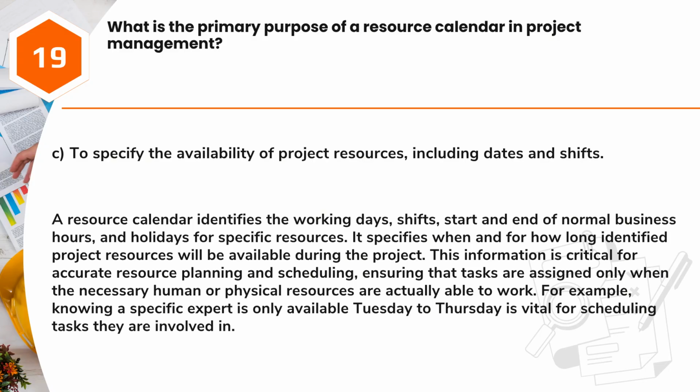A resource calendar identifies the working days, shifts, start and end of normal business hours, and holidays for specific resources. It specifies when and for how long identified project resources will be available during the project. This information is critical for accurate resource planning and scheduling, ensuring that tasks are assigned only when the necessary human or physical resources are actually able to work. For example, knowing a specific expert is only available Tuesday to Thursday is vital for scheduling tasks they are involved in.